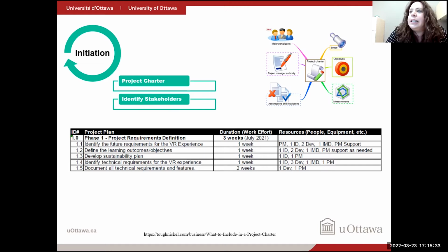And so during the initiation phase, it's just that idea where you now have to make sure you have the project manager assigned, that you have the financial resources committed, and that you've identified each one of your key players that need to become a part of this phase.